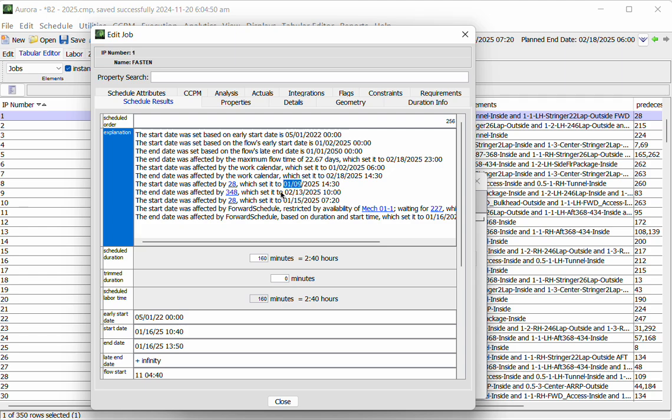You know, if this shows January 9th and this shows January 10th, that means that resources are having very little impact on where this schedule's kind of upstream in the network. And so if I were trying to move it to the left, adding resources isn't going to help very much. In this case, because it actually was delayed by almost 6 days, if I did want to move this to the left, there is some pretty good opportunity to do that by adding resources.